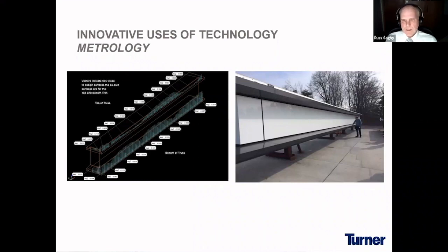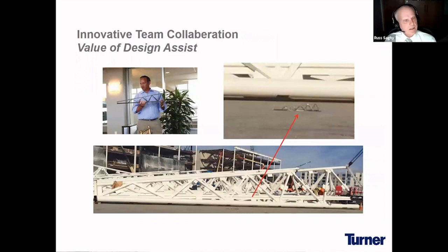If you go to the next slide, another innovation was the steel trusses that you saw in the time lapse going up onto the building. They were constructed in Kansas City, Missouri, full length, all 150 feet long, and then cut into 3 pieces and transported overland by truck and brought to the site.